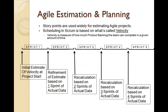Project estimation and planning for the challenges that we discussed. The Agile estimation and planning process is fundamentally based on the premise that the estimation process is done by the team and the estimates are owned by the team. The estimates are not dictated by project managers or by team leads. All team members participate in the estimation process, share their views on why they think it's a high or low estimate, and they agree on that estimate. So there is a team buy-in involved in the estimation process.